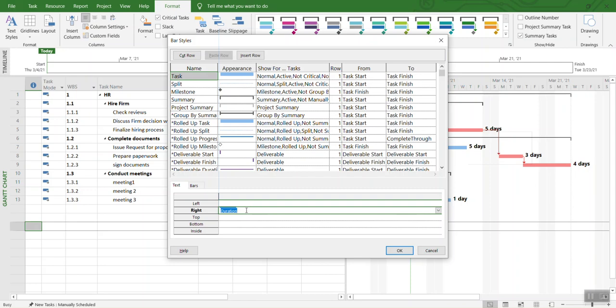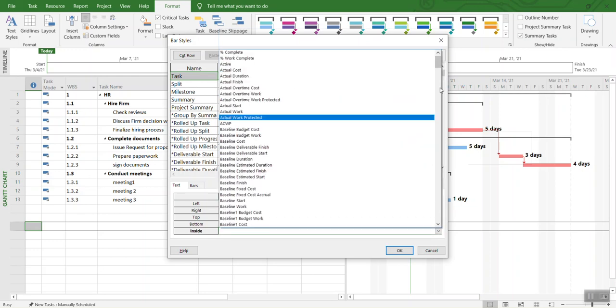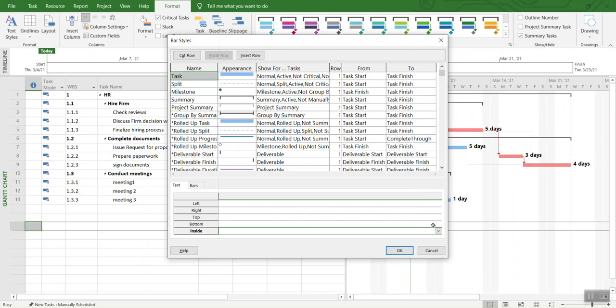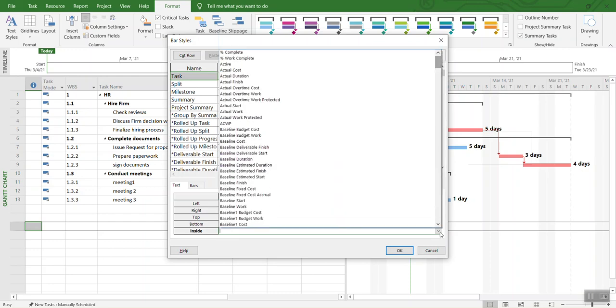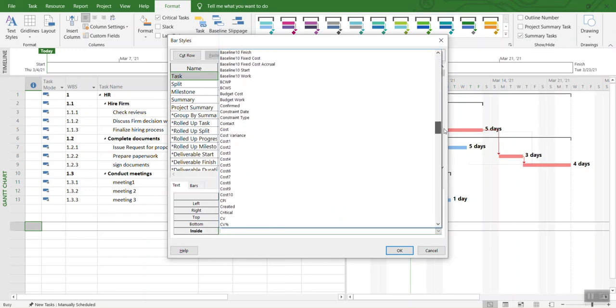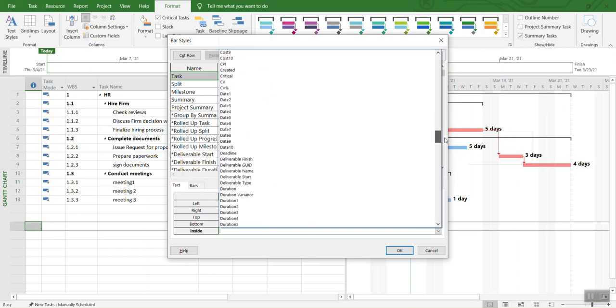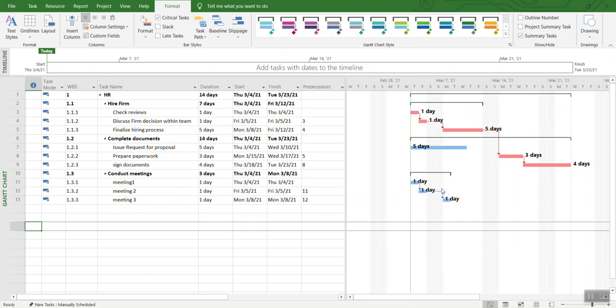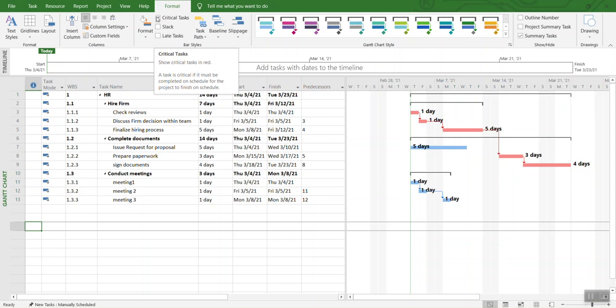Remove that from here and select Inside the Bar. Now we're going to select Duration again. You can select any of these items you'd like to display; in our case we're selecting Duration. It should appear within the bar, but again you can see the critical path did not reflect those changes. You'll need to go back to Critical Tasks, uncheck the box and recheck it, and now you can see it.